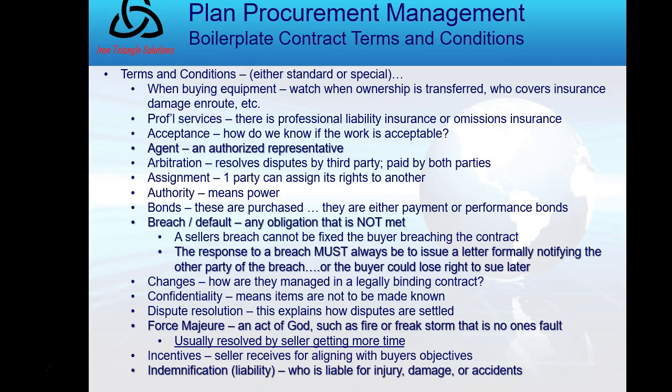What if they had a large contract? You wouldn't stop the whole contract payment to them if they're meeting those. You can't do that, but you might assess just that one small area. Okay? So the response to a breach must always be to issue a letter formally notifying the other party of the breach, or you could lose the right to sue later.